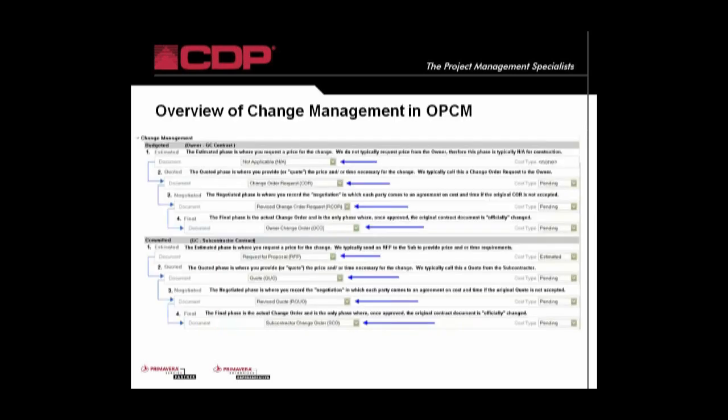Okay. Change management. Change management is going to encompass 3 modules within the cost information folder, or the contract information folder, and that's going to be the change management folder. The change management module, the proposals module, and the change order module. Okay. Within Contract Manager, you can perform change orders without creating a change management item or without creating a proposal document. You have permissions to do that if you've been set up appropriately in the system. Or you can use change management to manage the phases of change from proposal to final change order, which is what we have displayed here.